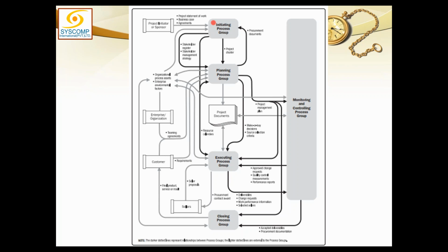But once he requests, then we bid for that. Before we bid for that, we must create our own business case. And once we bid, we get into negotiations and maybe we are awarded the contract. And once we are in contract, this agreement comes into being.